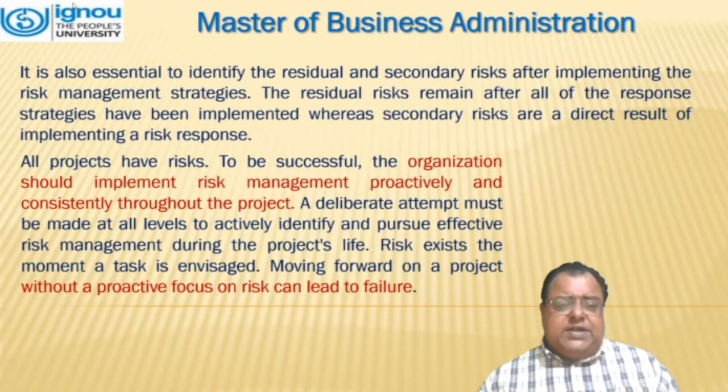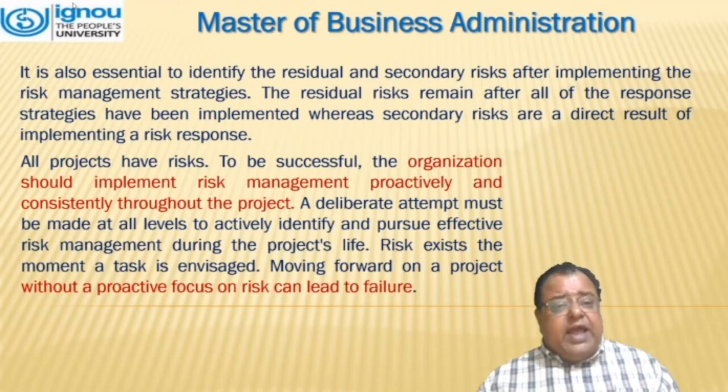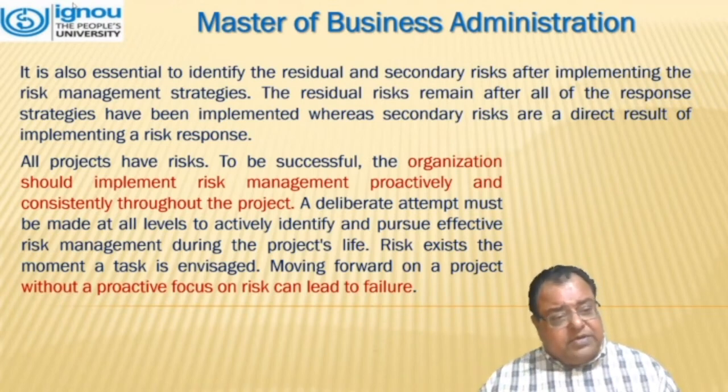It is also essential to identify the residual and secondary risk after implementing the risk management strategies. Residual risk remains after all the response strategies have been implemented, whereas secondary risks are a direct result of implementing a risk response.